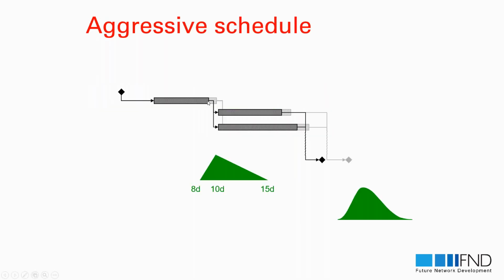And of course, you can motivate the team to work faster and harder and focus on the job more. This is an advantage, definitely. Because if I'm pushed by my management and my schedule, I will be dedicated to work and fully concentrated. But in many cases, an unrealistic, aggressive push can also cause demotivation of the team. Because if I believe I'm not able to finish this job in 7 days, and what my boss is saying is not achievable, I will never try to push myself, because this is impossible.